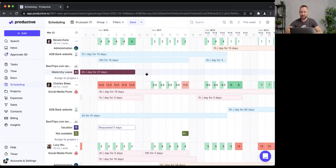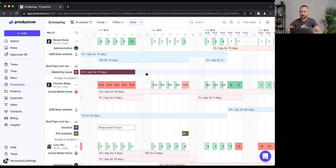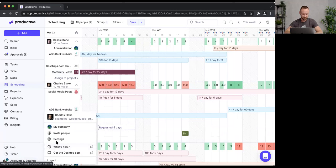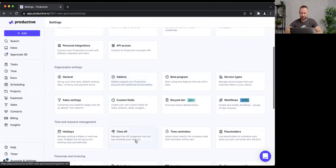Now let's move to one of my favorite topics in Productive: Time Off Management. Time off management is directly connected to scheduling and managed from the same screen, so I can see at a glance who is working and who is using their time off. If someone is on vacation or sick leave, they obviously can't be assigned to a project.